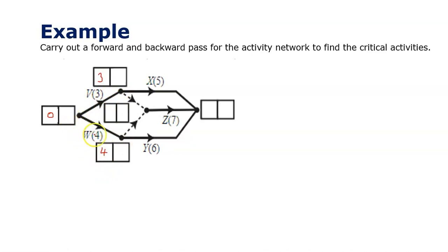There's 4. Now you'll notice there's 2 of these. This is quite similar to the one that we had just now. So I've got to be a little bit careful. You'll notice the 2 things that go in, I pick the biggest one. So I can see a 4 going in and 3 going in, so 4 is the number.